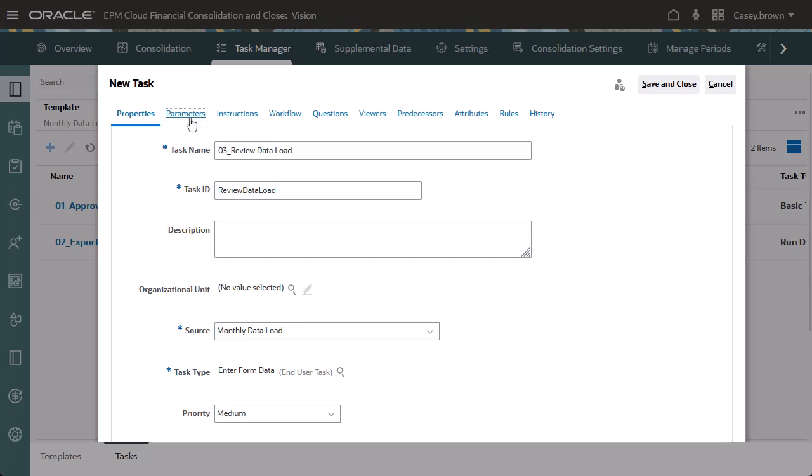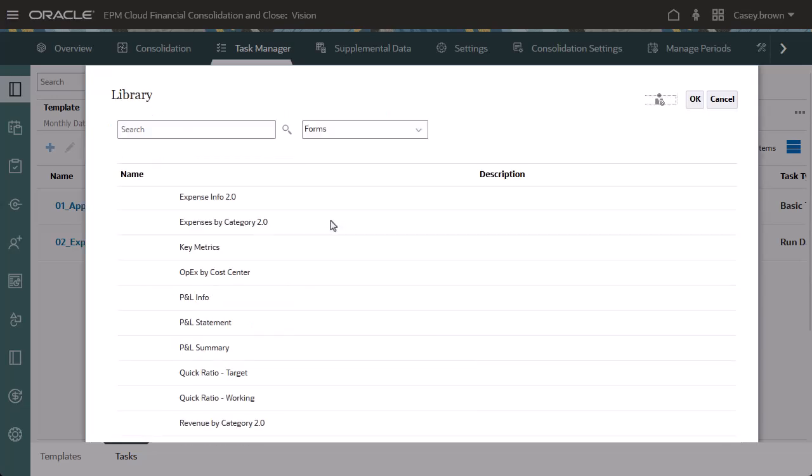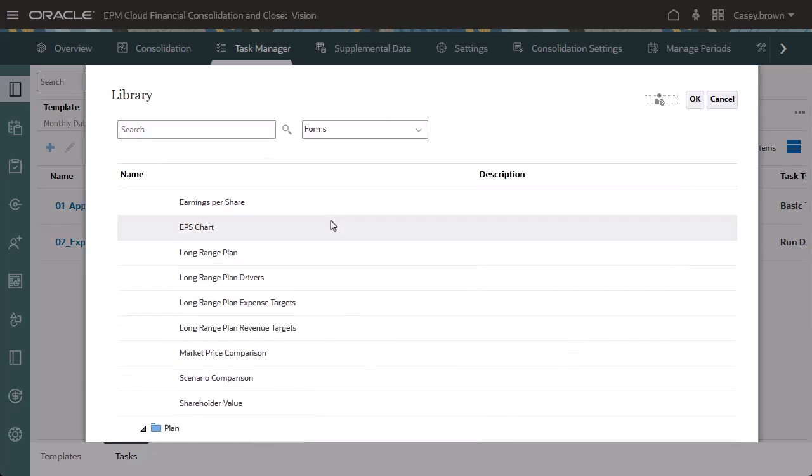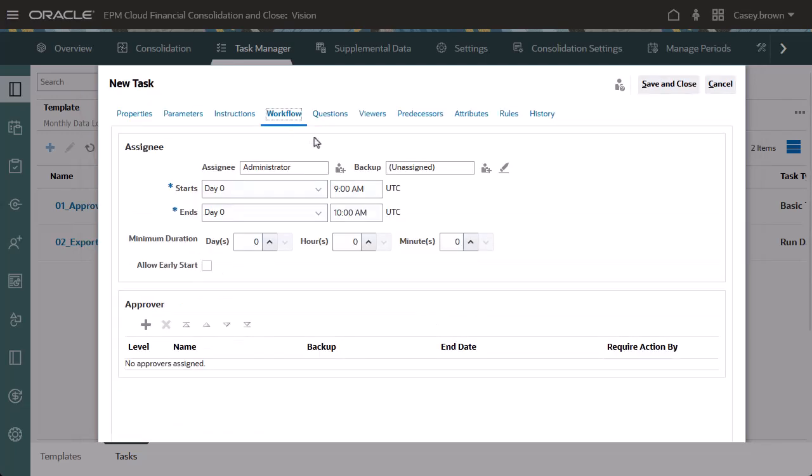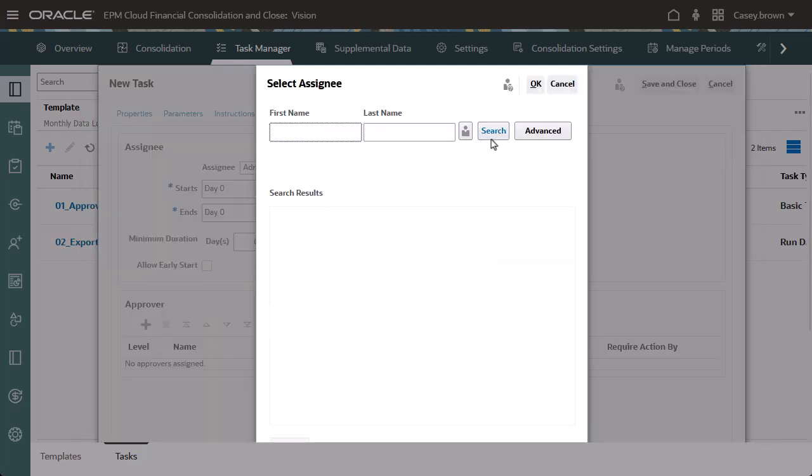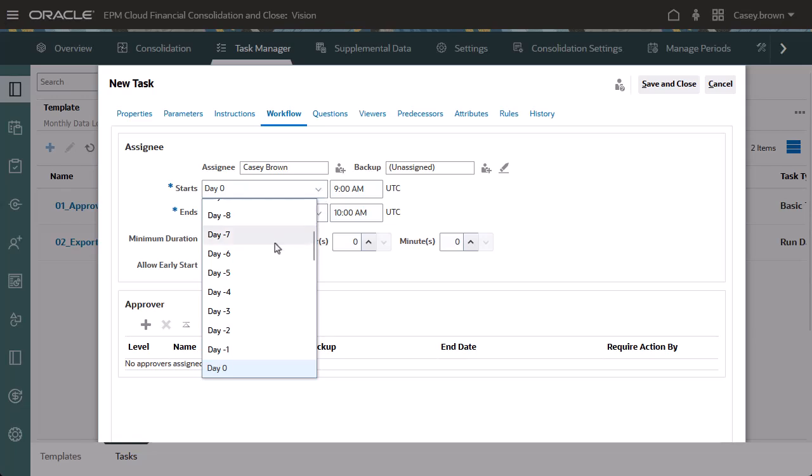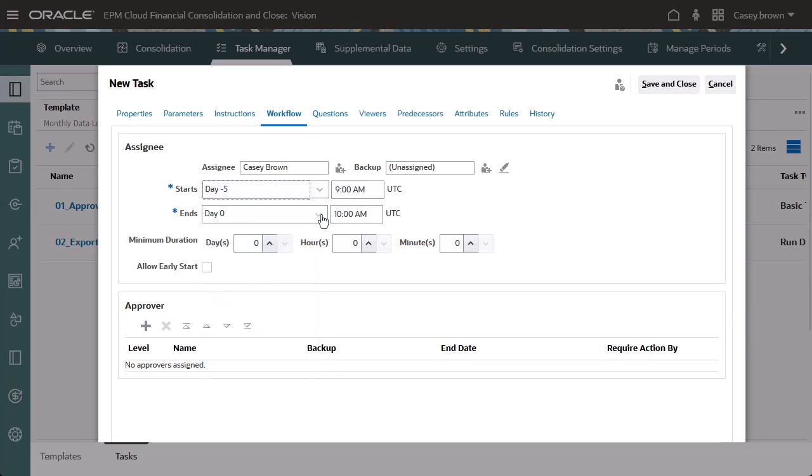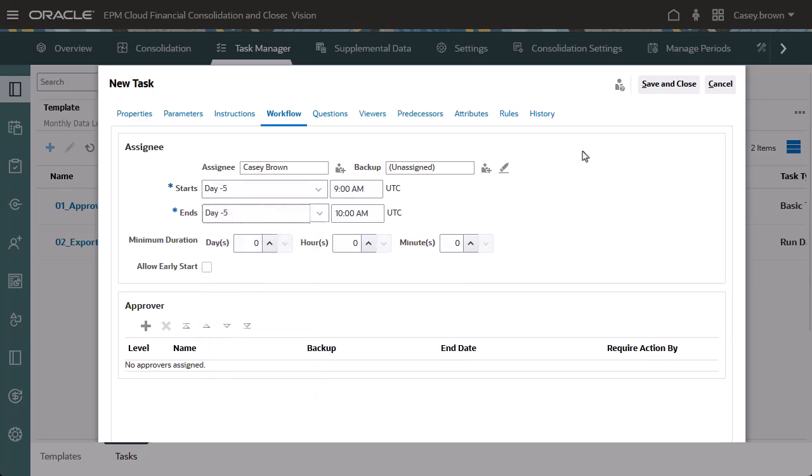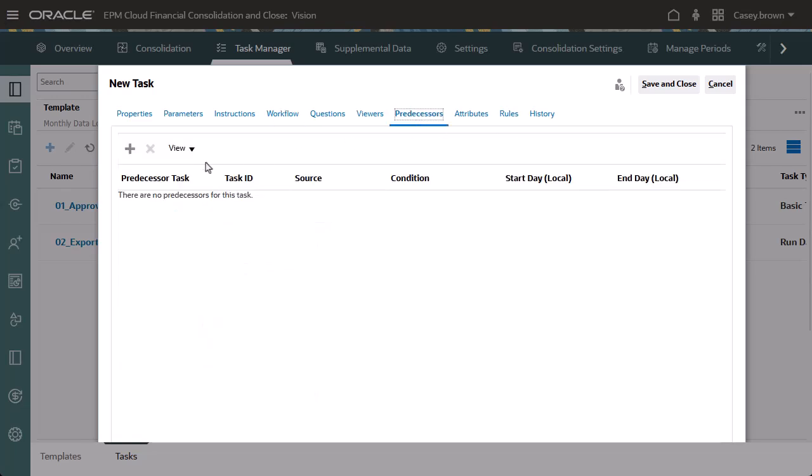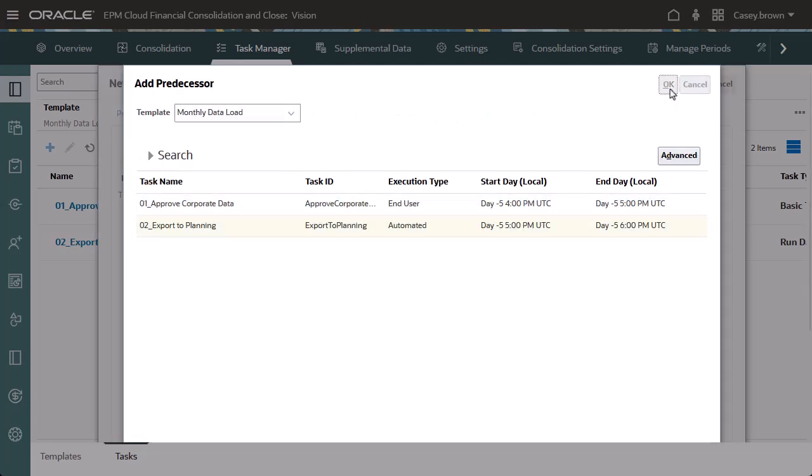On the Parameters tab, I'll select the planning form needed for the task. For end user tasks, use the Workflow tab to assign the user or team responsible for performing the task. I want this task to open as soon as the Export to Planning task finishes, so I'll assign the same start day and add Export to Planning as the predecessor task.